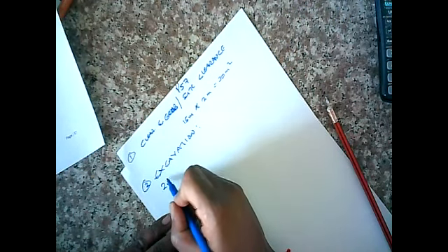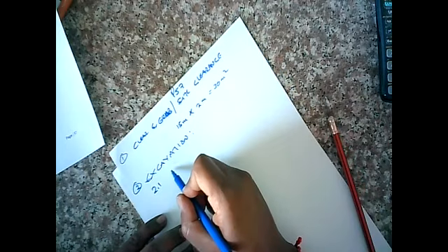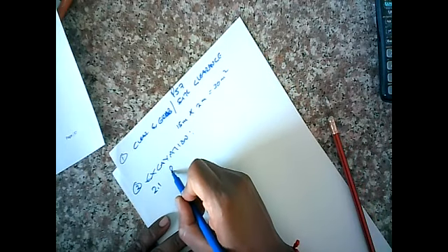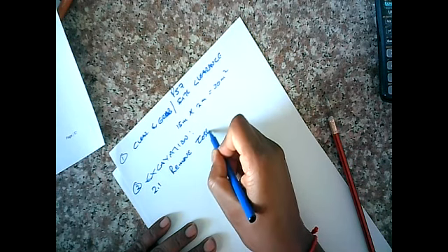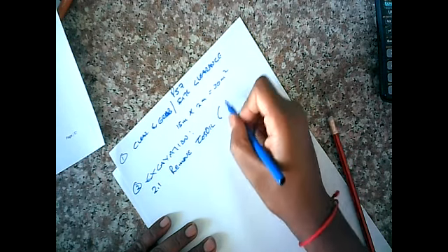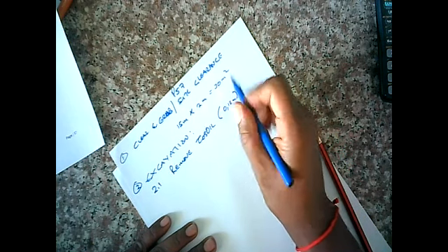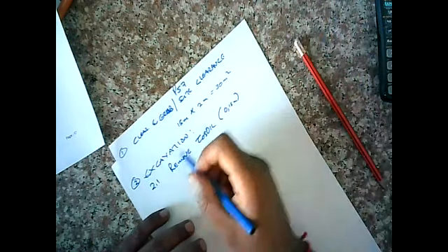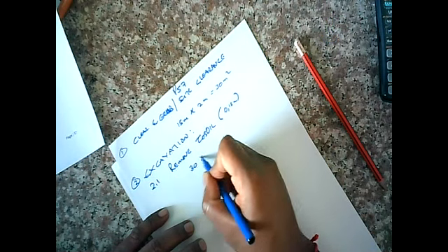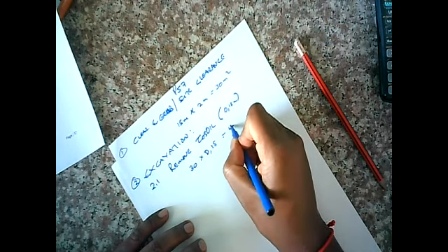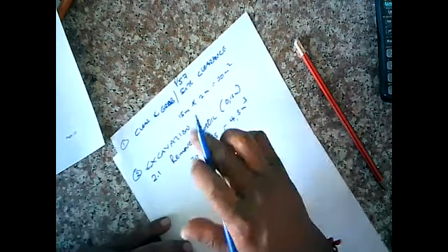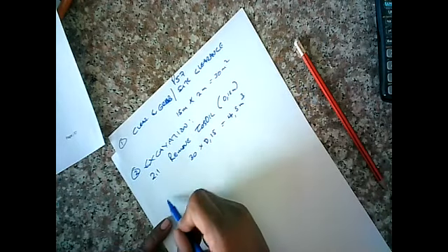All right, under excavation, we've got 2.1, right? From our previous question, the procedure, remove topsoil. What's the number that comes to mind? 0.15 meters. Always, doesn't change. All right, so we take our area from the top times the thickness of the topsoil, and we get a volume of 4.5 meter cubed. All right, so then we've removed the topsoil.